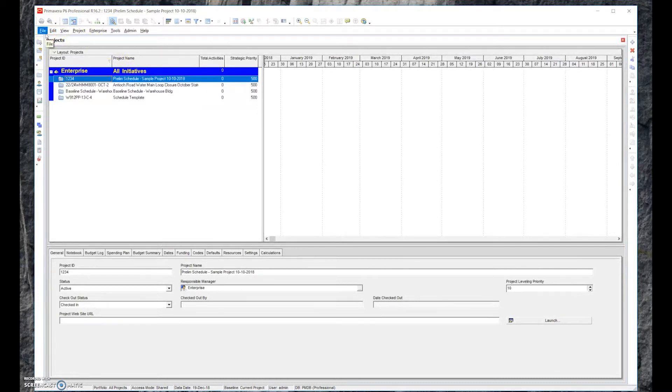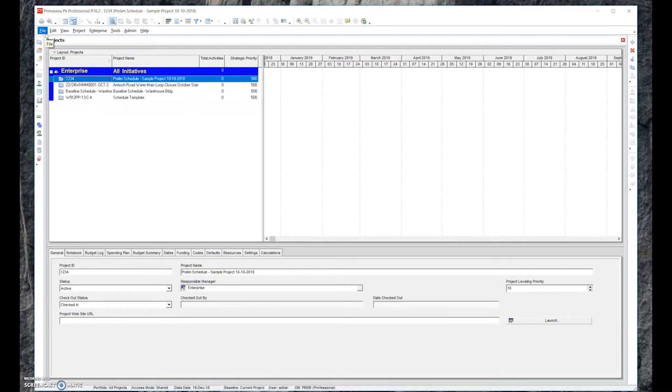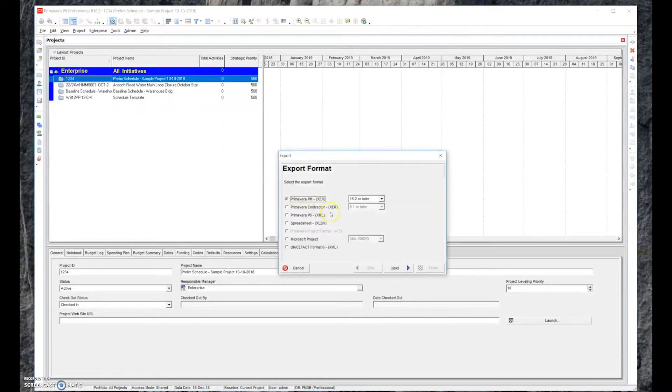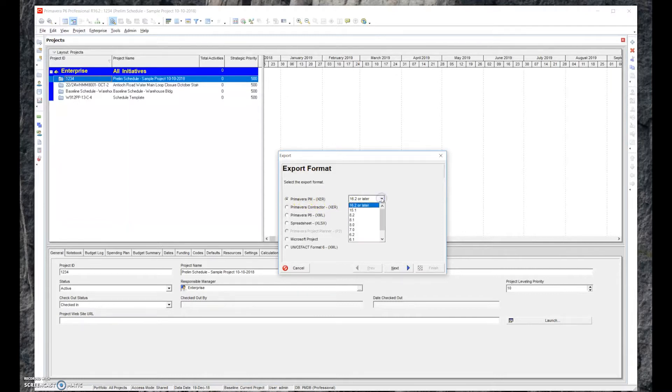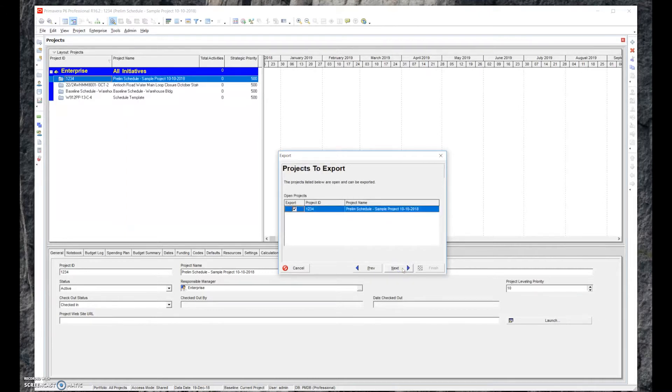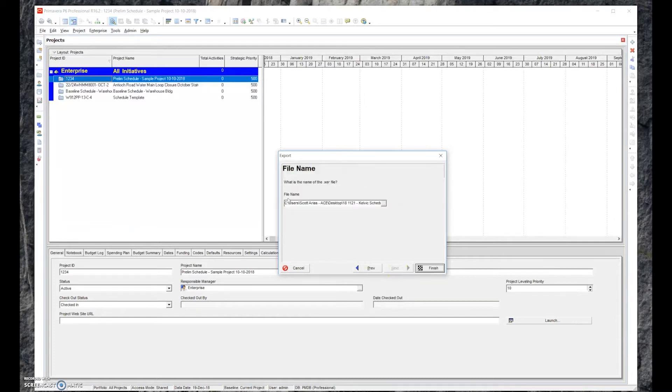Say that we want to save it. Now this is a database product, meaning you can import and export it. You don't have to hit save as. If you accidentally exit out of Primavera, it'll save it in the database where you're at. But just to be safe, say I want to export it. You're going to export Primavera XER to whatever version we're using, 16.2. We're going to hit Next. We want to have the project outputted with the same name that we used and export that.